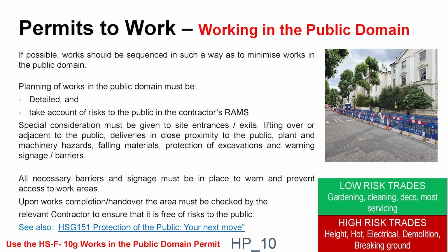And then public domain, this is one which is quite relevant with the welcome sites, because a lot of them are right on the street. So you need to think about closing off the pavement, making sure that people aren't walking underneath people on ladders and all that kind of stuff. So that's most relevant with welcome. And property managers need to think about that when they're instructing works to commence. If you're instructing window cleaning, or any works to your gutters, if your building is on a main road, you're going to have to cordon off the area.